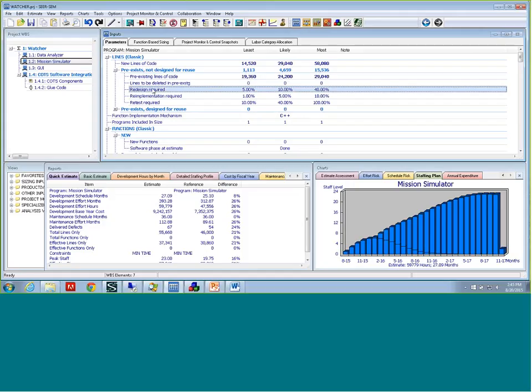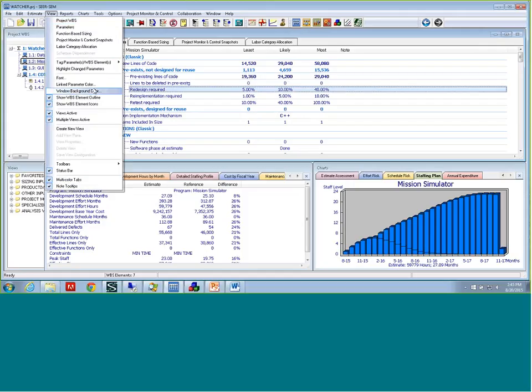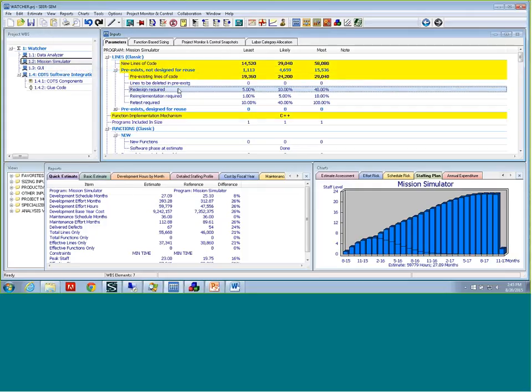And just to jump in there, VHDL is fine in terms of it's a driver, but the reason why the SEER for hardware IC solution exists, which is a completely different tool, is because after a significant amount of study, we determined that things like die size and logic gates were actually the drivers towards the cost for many of the applications in terms of FPGAs, ASICs, RFICs, and the like.